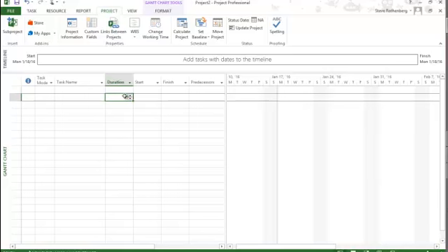On page 22, you'll look at milestones, which are simply ways of indicating that a certain critical point is reached, and that if that milestone is delayed, then very likely the project is going to be delayed as well, unless remedial factors are put into place some point down the line before the project's over. Onto page 23, creating summary tasks.